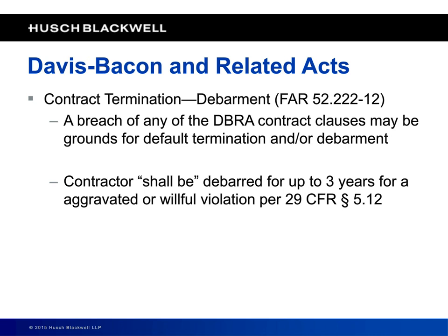But the good news ends there, because I want to talk to you about another case. And it's another case out of Ohio. If you look at your resource tab, you're going to see that there's a blog article that we prepared about a criminal indictment in Ohio relating to Davis-Bacon Act violations. The case is called United States versus Marcus Butler. Mr. Butler owned an electrical subcontractor that worked on various Department of Housing and Urban Development projects. And he was indicted and faces jail time for knowingly and willingly submitting false certified payrolls. That's all the indictment said.